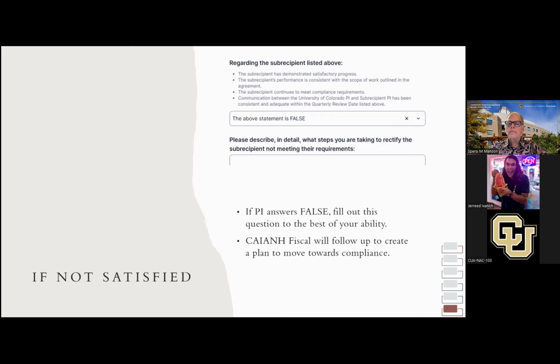Yeah, we can be really creative. With TG3, we just had this happen, where they're doing the implementation phase of their project, so the whole idea is that they are hands-off. A cost reimbursable subcontract wouldn't make any sense, because the idea is that the clinics they're working with are doing this on their own. So we set up a different type of agreement and worked directly with contracts to draft a very unique agreement for them, so that they could get the money upfront and then do the implementation part of the project. It just takes a little bit of back and forth with contracts.